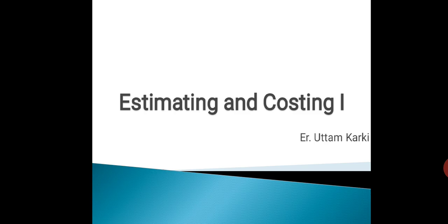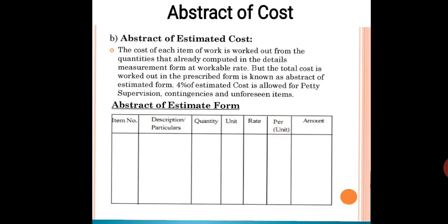Topics include bill of quantity, contract management, and abstract of cost. Abstract of cost means the cost of each item of work is worked out from the quantities already computed in the details measurement form at workable rates. The total cost worked out in the prescribed form is known as abstract of estimated form. 4% of estimated cost is allowed for petty supervision, contingency, and unforeseen items.